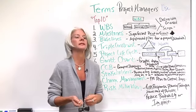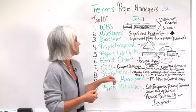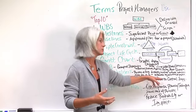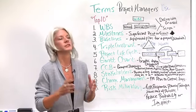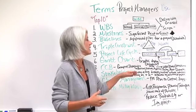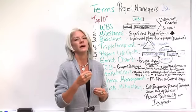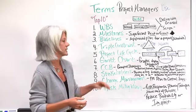The other one is the change management. So many times there is confusion on managing change and change management. They sound similar, but change management is a project management plan, so it includes the processes on who does what, when, and where related to the changes on the projects. And this project management plan is to control the scope, versus managing change, which is typically associated with managing change of a project. So a project is initiated or executed, and it's going to infiltrate different organizations or groups of the corporation, and that change is going to trigger emotional behaviors in the company. So there are many organizations that focus on managing the change, and they come in and help the organizations with the communications and the planning for the people so that it doesn't cause mass chaos when that project is implemented.